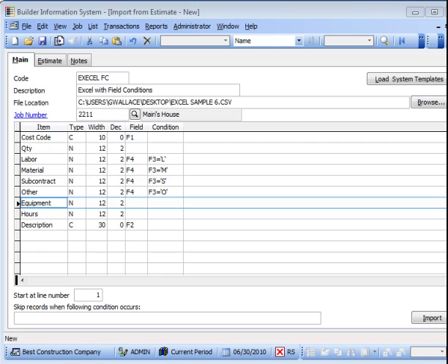Once the budget information has imported successfully, you may opt to save or not save the template and proceed to the budget. Note, once the budget has been completed, there is a process that allows you to create a schedule of values from the budget with the option to utilize % markup values. Please refer to the tutorial on creating a schedule of values from a budget.